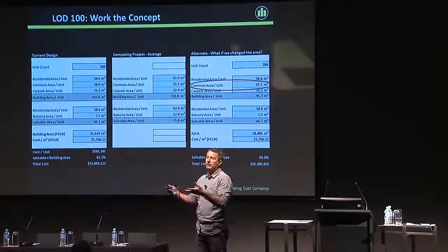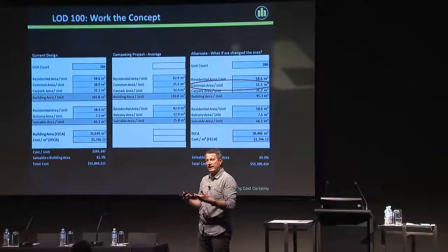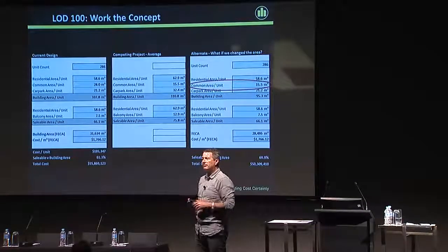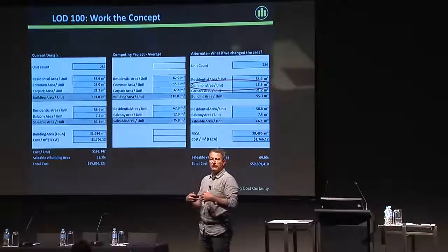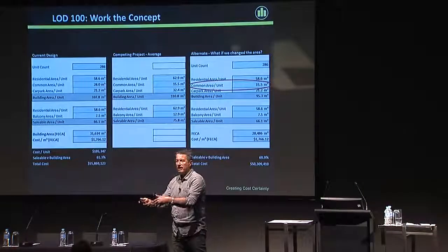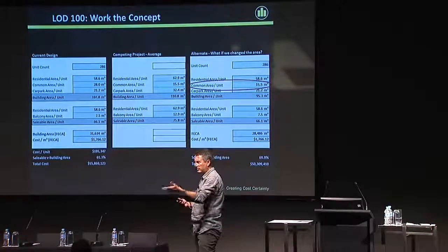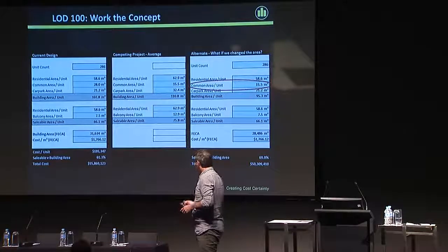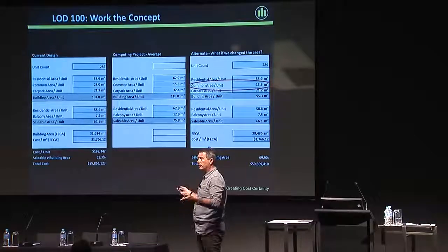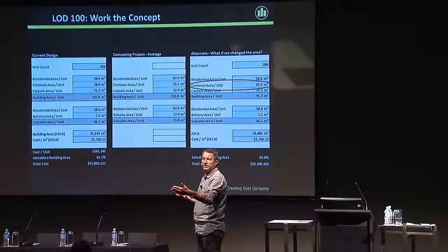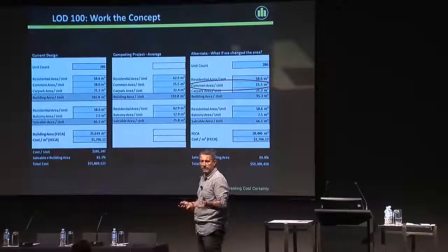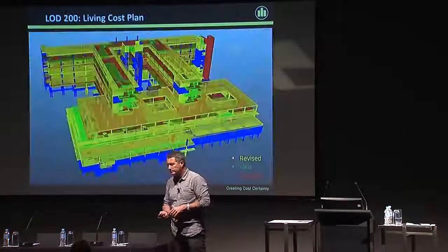So if I instruct the designers to tighten that up and they're successful, they'll save $6 million. The alternative is they make the saleable area bigger and the project produces more income. So it's these types of big decisions that need to be done at the outset. You won't save $6 million on a project or 10% on a project when you're at tender. You're left with mucking around with carpets and things like that.